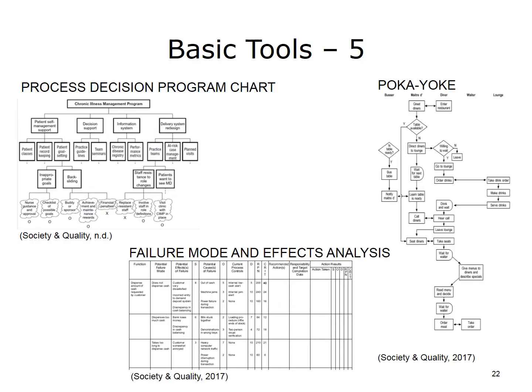Process Decision Program Chart. The Process Decision Program Chart is a type of contingency plan that guides the efforts of a team when things do not turn out as expected. The actions to be completed are listed. Then possible scenarios about problems that could occur are developed. Management decides in advance which measures will be taken to solve those problems should they occur. This chart can be helpful when a procedure is new and little or no experience is available to predict what might go wrong. TOG 2004.